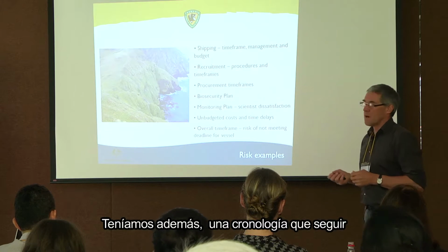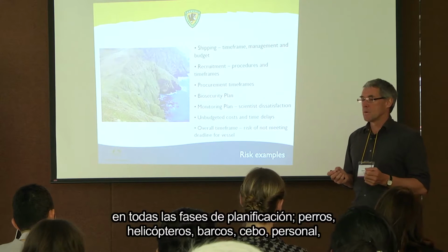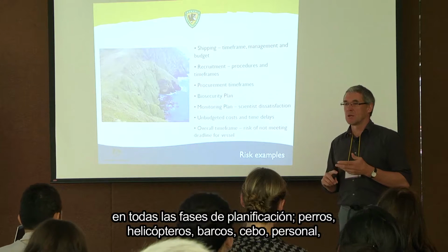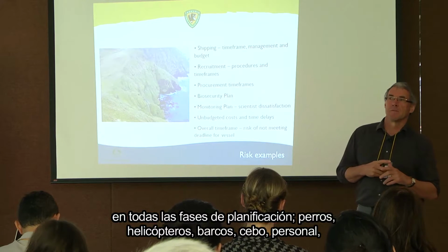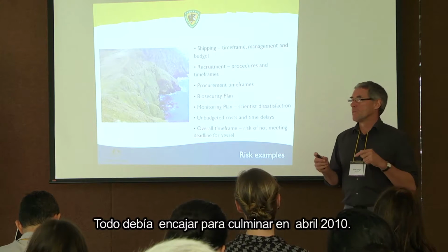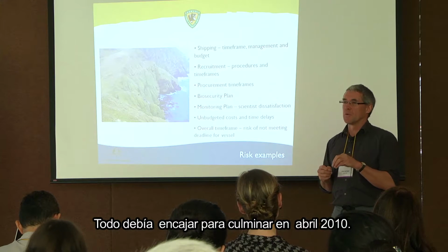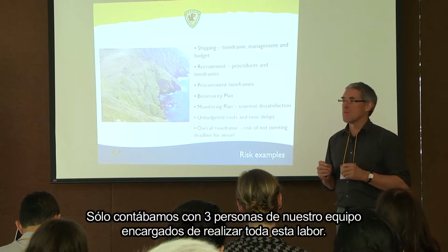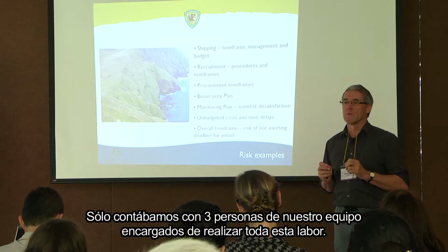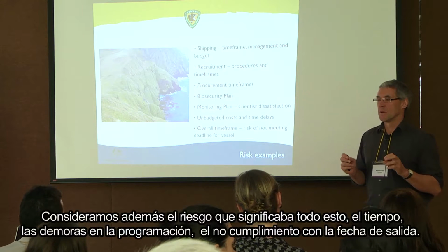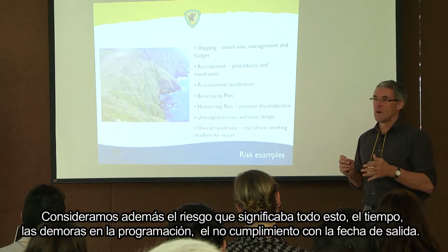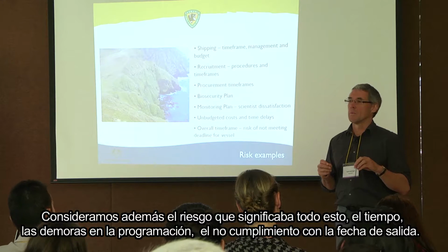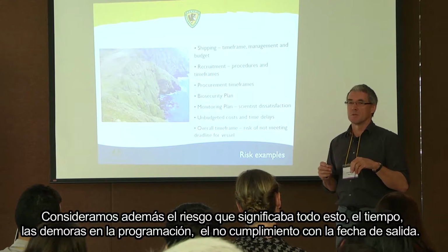And then there was this overall time frame. We had so many balls in the air with the various planning phases: dogs, helicopters, ships, bait, staff, and all of them had to dovetail to the point where they were all finished by April 2010. And we only had 3 people on our project team who were doing all of these things. So for us, there was a risk that as time went on, if we slipped in the timeframes of some of those components, we would not meet the deadline for the ship departure.